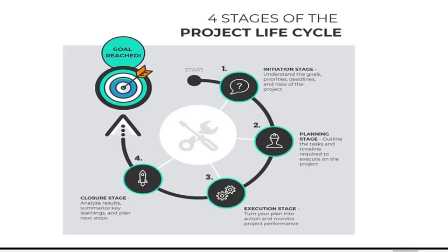Now, during the final closure or the completion phase, the emphasis is on releasing the final deliverables to the customer, handing over the project documentation to the business, terminating supplier contracts, releasing project resources, and communicating the closure of the project to all the stakeholders and the project sponsors.